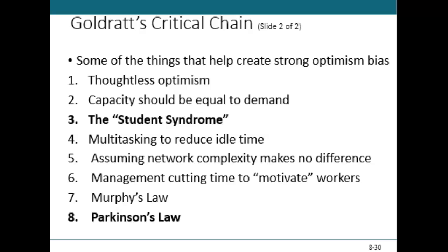Parkinson's Law is an application of the concept that if I have 2 weeks to do an activity and I finish within a week, I'm going to sit on it. I may review it. I'm not saying I'm sitting on it for bad reasons. I may want to review it again, but I'm not going to turn it in, right? And that's Parkinson's Law. And we want to keep the project moving forward.